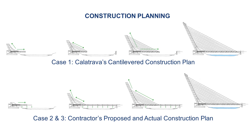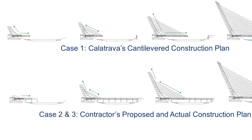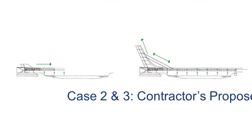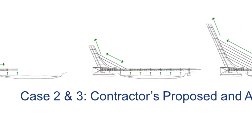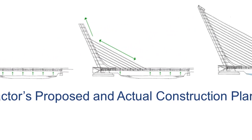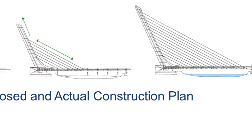The second construction plan, Case 2, was submitted by the two construction companies along with their bid. This plan called for temporarily damming the river to expose the riverbed underneath the bridge deck, then constructing the hexagonal box girder on temporary supports placed on the exposed ground. The same false work would also support assembly of the roadways, following some distance behind the box girder starting from the pylon side. Construction of the deck could thus proceed ahead of the pylon independently. Simultaneously, the concrete pylon would be cast in segments connected with cable stays to the finished deck segments, with false work removed as needed for balance. According to this revised schedule, the bridge would take one month longer and be completed by September 1991.